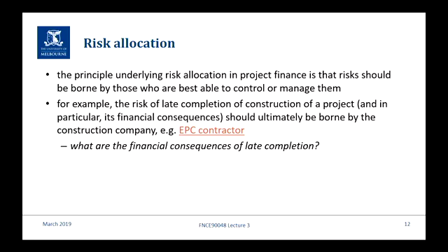Remember, you've got to start paying back the loan when you get into operations. If you get into operations 6 months late, you've got that big amount of money still outstanding that hasn't been repaid and generating more interest. Remember I said before, our 800 plus 100, we owe 900. We're supposed to start paying that at the start of 2022. No, we can't do it. So the 900 is trickling up to 905, 910, 915 million dollars. So just the extra interest cost.